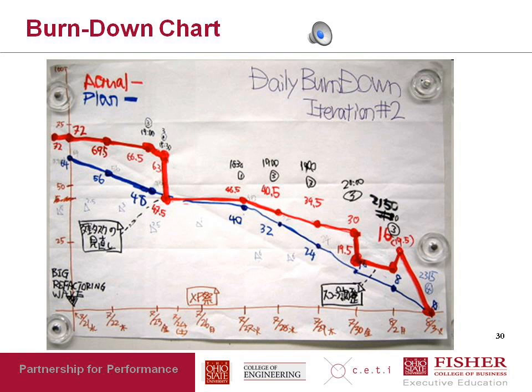So you started off with 64 story points. At the end of some time period, you ended up with 56, probably at the end of each iteration. At the end of the next iteration, you ended up with 48. At the end of the next iteration, you ended up with 40, and so on and so forth. That's how you planned for your story points to be implemented.